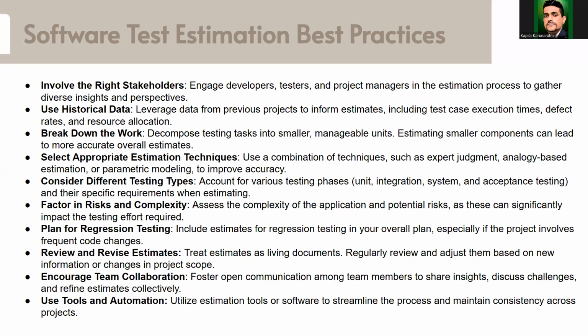For some complex applications we need to think about what kind of effort will be required. If it's a simple application, the effort will change, because for a complex application, if you are going to write test cases, you might require additional time, while for a simple application you can do it fast. And how much regression we are going to plan: based on the technology and the developer experience, you might expect a large number of defects. Then you have to plan large effort for regression and retesting. But if you have a very strong development team that you know will not have many defects, your regression effort will be less because defect fix time will be less.